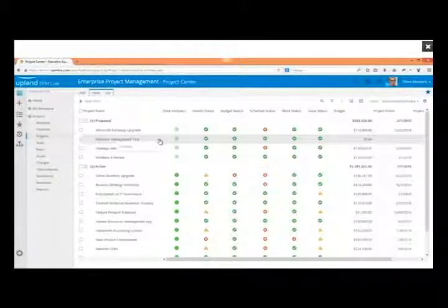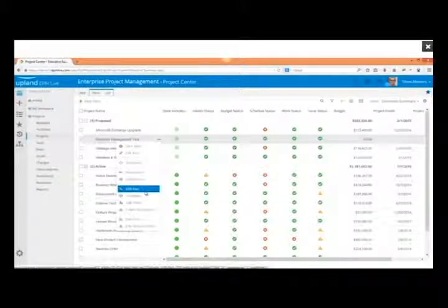And now I'm not building a detailed project schedule yet. I'm just building a high-level resource plan so I can start to get an idea of my resource load without having to go build that detailed schedule. It might take me weeks to build, and we might not even be doing this project if it doesn't get approved or if it gets delayed or whatever it might be. So later on, I'll actually build my detailed project schedule, but first I can start with my high-level resource plan to answer those 2 questions that we mentioned.